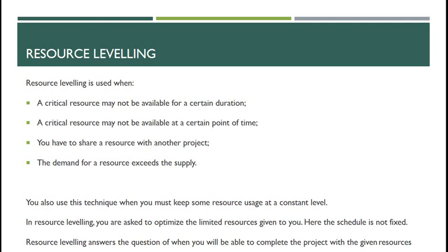And the final one is the demand for a resource exceeds the supply. So you can use this technique when you must keep some resource usage at a constant level. In resource levelling, you are asked to optimise the limited resources given to you, and here the schedule is not fixed. So resource levelling answers the question of when you will be able to complete the project with the given resources.